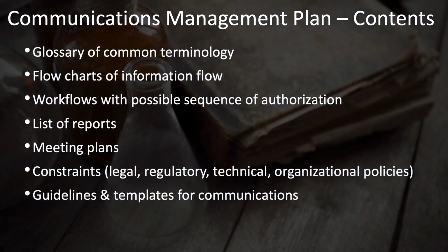Also note that there may be technical terms and abbreviations and acronyms that everyone may not be aware of and know the definitions of. So it is useful to include a glossary of these kinds of terms that will be used during the project or in other project documents. Flowcharts are a wonderful visual way to represent the flow of information in your project and to make sure that your stakeholders understand how this information will flow and to get their feedback on this information flow.